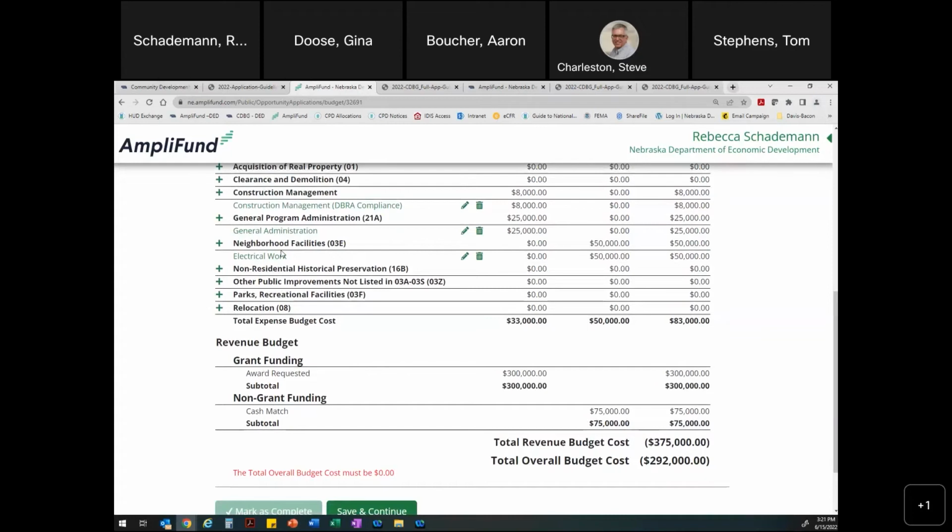Well, you might want to include any engineering costs that might be associated, or architectural, would be helpful. But then sometimes you don't want to go into like the electrical work. You don't want to divide that into 8 different things that would all qualify as electrical work. And so it's kind of like you want to get specific, but not too specific, I guess, if that makes sense. But I always find it helpful for the architectural and engineering fees to be included there as well.